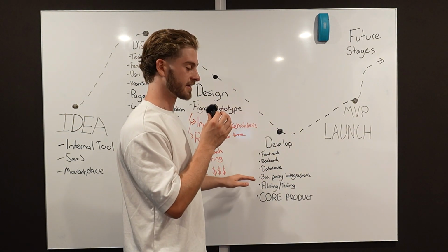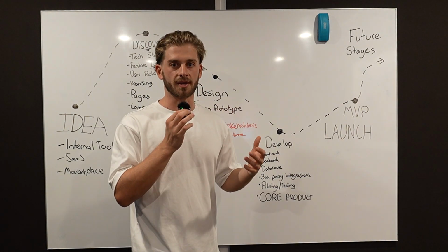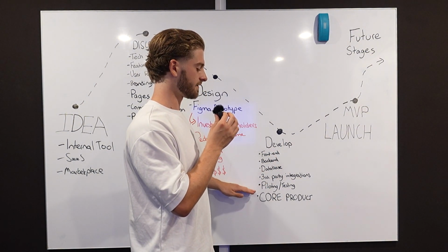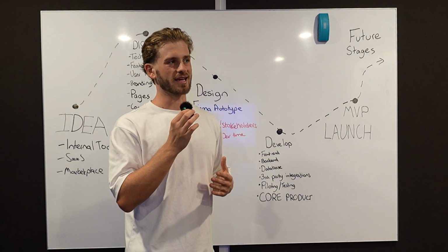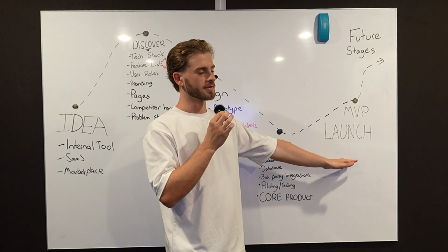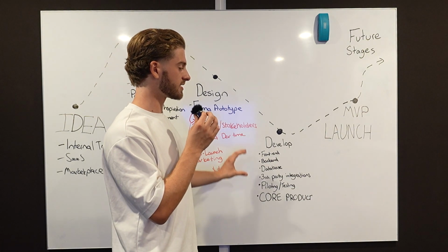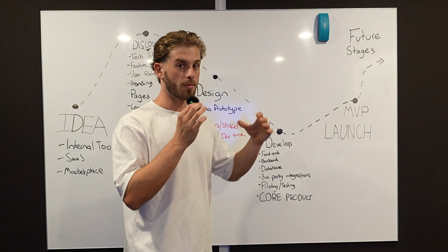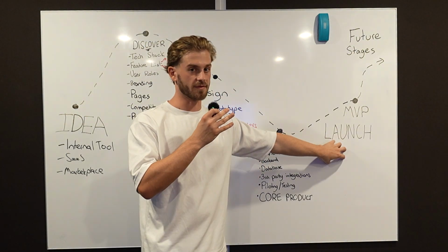So sometimes making small changes to things in your database or small changes to things in your application can break other things that you wouldn't expect. So this piloting and testing phase is really important. And some people have misleading expectations on how well an application should flow in an MVP. Now, it really depends on your complexity, but the other reason we try and keep it lean is because the more you try and stuff into this develop phase, the more features, the more moving pieces that we have to connect together to work perfectly on MVP launch.